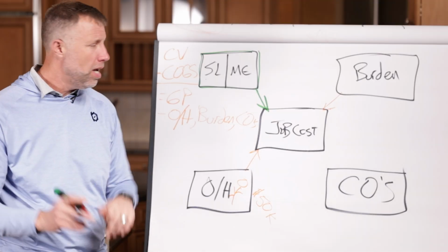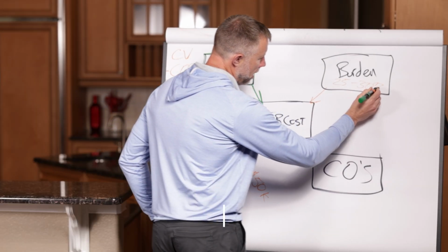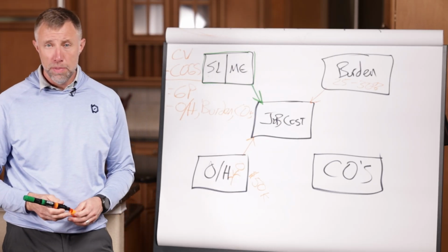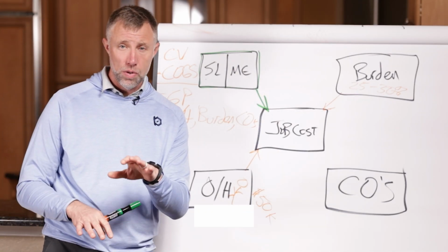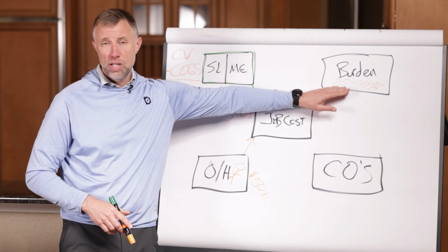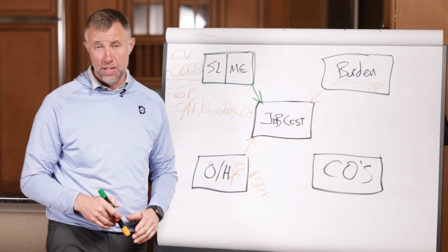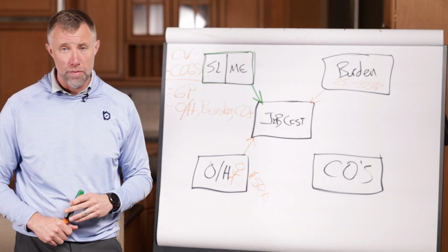Now, typically, we put a factor of 25 to 30% burden rate on every person that we hire in the business. This is good practice. Now, again, talk to your accountant. We are not accountants or CPAs. This is educational material. Make sure you talk to your accountant and you guys come up with a proper rate. I will tell you this, anything less than 20% is probably going to be way too short for what you're looking for.